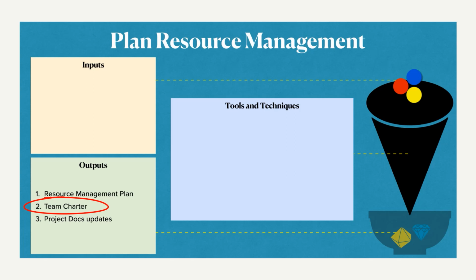So it is just a set of organizational rules given to the new team, or the project rules, because every project is special. Some customer might expect communication to happen in a certain way, some meetings to happen in an organized manner, some reports to be given to them regularly, some specific standards from the customer to be used for giving them the reports, right? So all these rules are given in this team charter. They are taught to the team, right? And then the agreement is given.